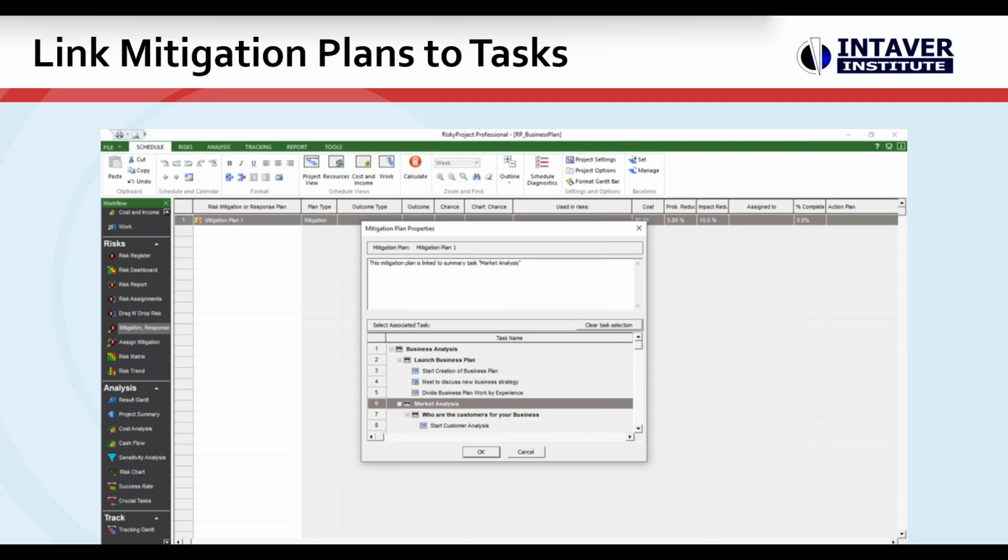One of the endpoints that we like, when we're doing quantitative risk analysis, is once you've done your planning, you want to put your risk burn down activities or mitigation plans into your schedule. And each one of those will have a duration. They'll have resources, who's in charge of it on your schedule. Costs might be involved in that as well. And those can all be linked to your mitigation plan.